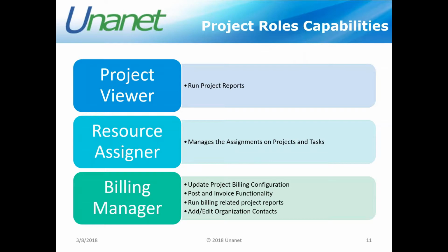Another one of the project function type of roles is that of resource assigner. Now, I think sometimes, and I know when I'm teaching classes, I hear this a lot, there's a bit of a confusion. They think, well, a project manager can assign people to those projects. Well, they can't. The resource assigner role is needed to be able to manage the assignments on projects and tasks. So you have to have the resource assigner role so that you can go in and make assignments, edit assignments, do all those different things in regards to assignments. You cannot do that without the resource assigner role.